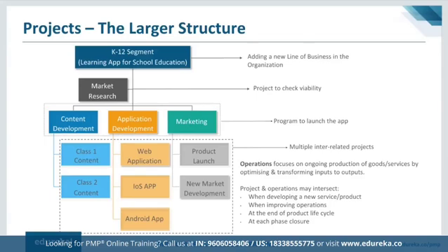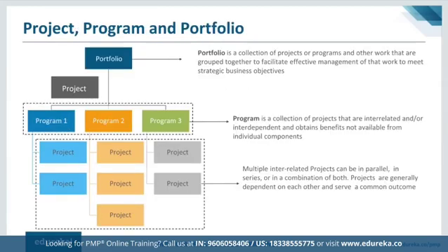And at the end of each phase closure, we need to also invite the operations team so that there is a proper handshake happening and they are not engaged only towards late in the project. So some of these things need to be taken into consideration. So I hope this example must have given you a fair idea about program, project, and how a typical strategic plan initiates the launch of a program and a project. So project, program, and portfolio is clarified.